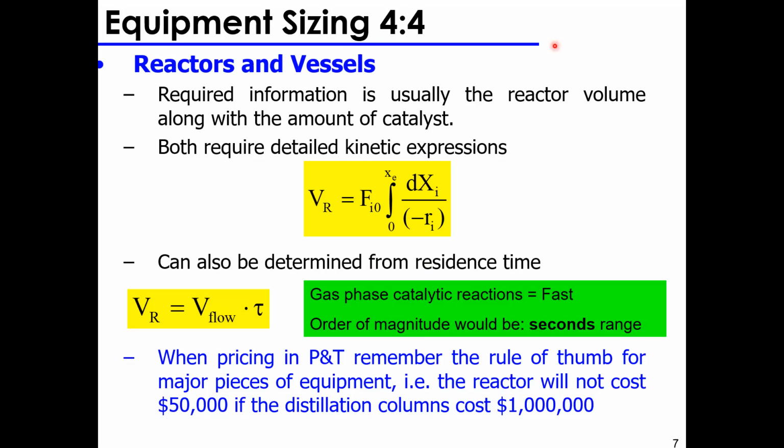Okay, if your calculations are always off and you're always getting $50,000, then just say, okay, it's 1 million as a conservative estimate, and you use this number in your initial design of this process. You're always better off with a very conservative estimate, i.e., overestimating the cost at the initial stage than underestimating the cost, and then when it comes to detailed design, you find out that you budgeted for a lot less money than what is actually needed.